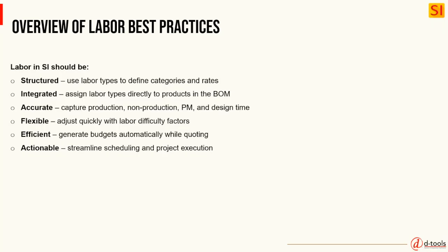Third, accuracy is everything. So SI's labor type structure accounts not just for production time, the actual work, but also non-production time, for example, shop time or drive time. And don't forget about project management and design. All of that gets rolled into hours and dollars automatically.